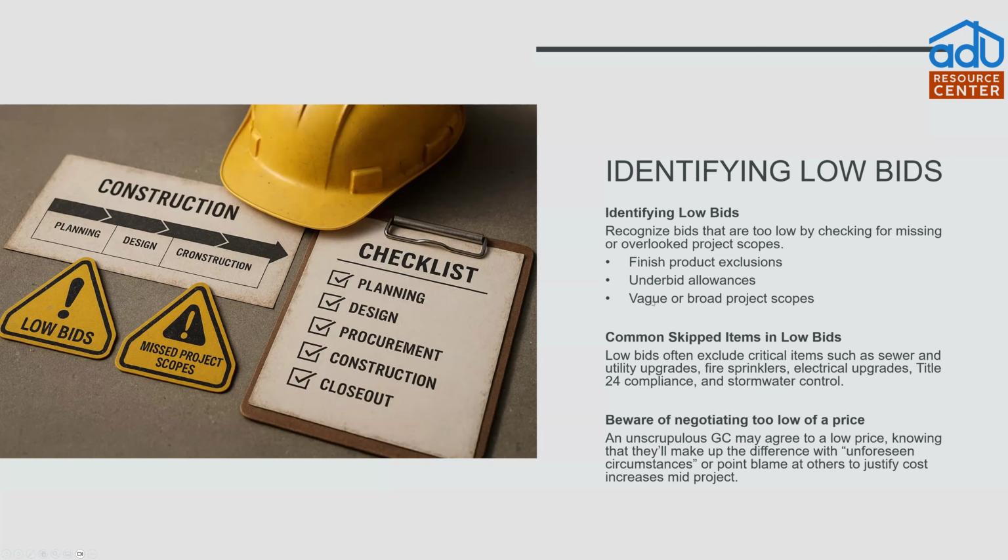And then also be very cautious of short contracts. If the contract isn't highly detailed, going over the complete project scope and everything that's included in each one of the trades, there might be some hidden things that you'll end up paying for in the middle of the process.